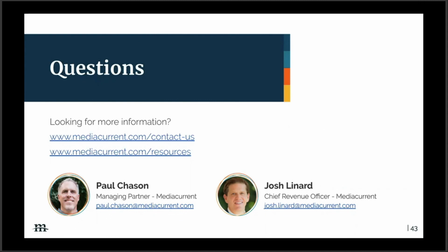Yeah, and I'll add to that. It really kind of goes against Agile in a lot of ways, because as Paul mentioned, you're setting the milestones up front. The other thing that gets tricky, especially in website projects, is you'll find some overlap. So there's not always really good cutoff points to where you'd have a place you could stop and just invoice for the work being done.